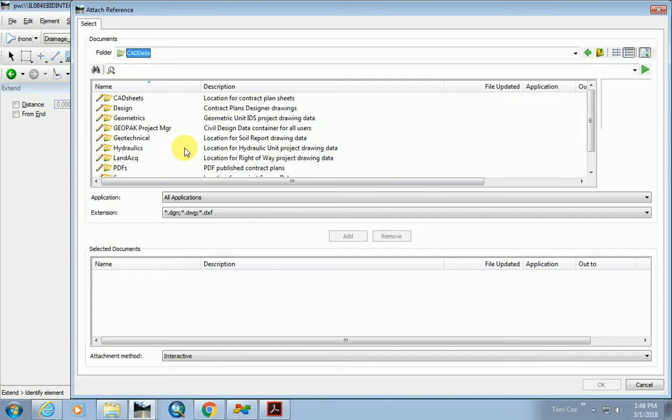And so Andy might do exactly what Stella was doing, because he's going to do research in multiple ways. He's telling you right up front. He'll usually put a note in the file. This right of way is not exact because, like Brian said, that center line might not be dead center as to when the property was developed. So that's where you start, though. And that gives you a pretty good idea if you need to buy right-of-way. If you need to buy right-of-way, then they have to do a land survey.